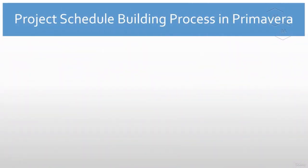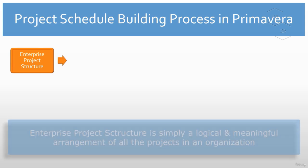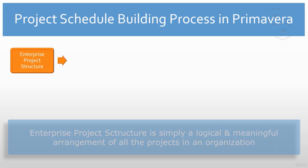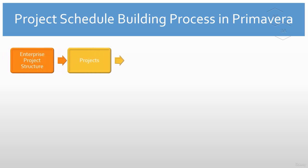Let's understand this process step by step. We will create the enterprise project structure in Primavera P6 if it's not created previously. Enterprise project structure is simply a logical and meaningful arrangement of all the projects in your organization. As a first step, after the EPS, we will create a project in the Primavera P6 database.